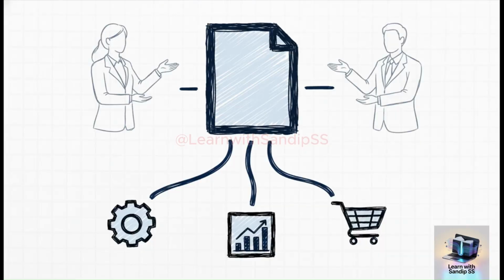So, how do you even begin to define the scope? The great news is you're not starting with a blank page. Your single source of truth here is the Customer's Digital Discovery Assessment, the DDA. This is the key document where the executives have already listed out the business processes they want. It is absolutely your starting point.